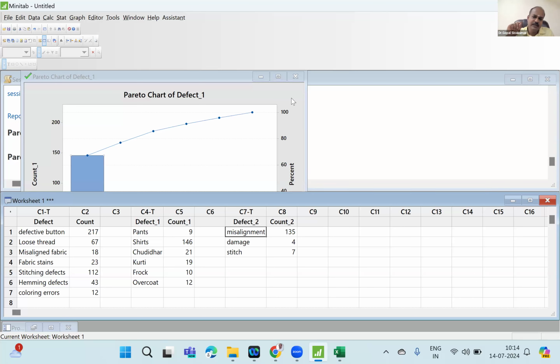But situation cannot be like this always. Yes or no? Yes. So the idea to be followed, the principle to be respected, is solve problems one at a time. And make sure the problem you are trying to fix is specific in nature. And make sure you can measure the problem using a single metric. If you need multiple metrics, please note it should lead to multiple projects.